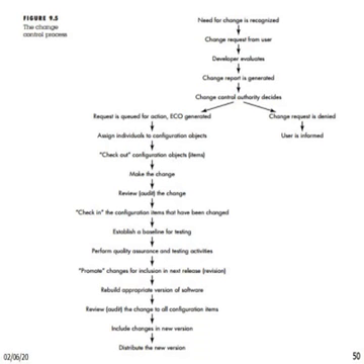An engineering change order, ECO, is generated for each approved change. The ECO describes the change to be made, the constraints that must be respected, and the criteria for review and audit. The objects to be changed can be placed in a directory that is controlled solely by the software engineer making the change. A version control system updates the original file once the change has been made.